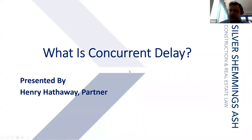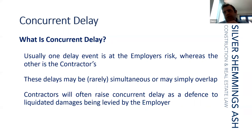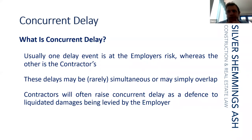Running through the different instances — what is concurrent delay? The starting point is essentially that one delay event is at the employer's risk whereas the other is the contractor's. The delays may be simultaneous or simply overlap. Contractors will often raise concurrent delay as a defence to liquidated damages being levied by the employer. A key term throughout is causation — a breach or event has occurred, and we must treat those competing causes accordingly.